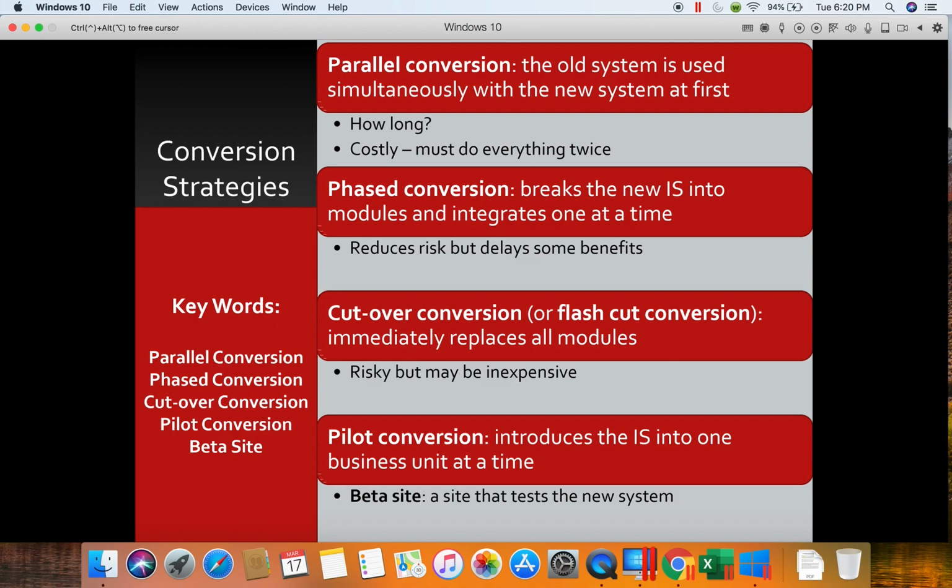We only did this for 2 periods or 1 month. 2 payrolls. They did 2 each month. We didn't do it for a year or 6 months because it's very costly and very time consuming. But to do it twice to make sure we got the same answer in 2 different payrolls gave us a comfort level that it was working correctly.